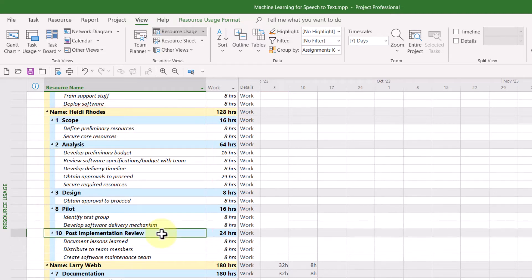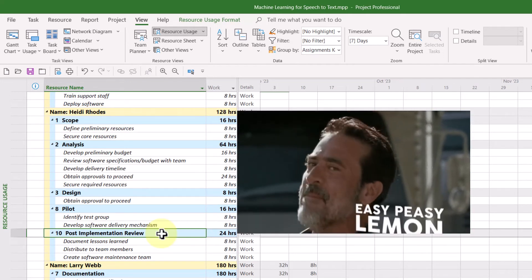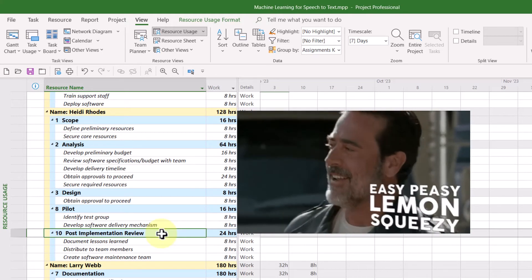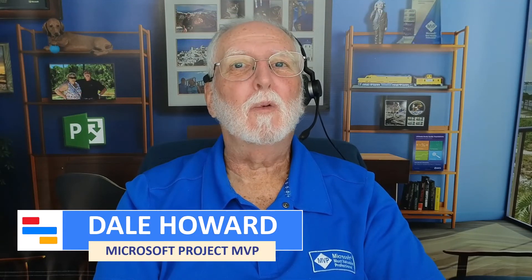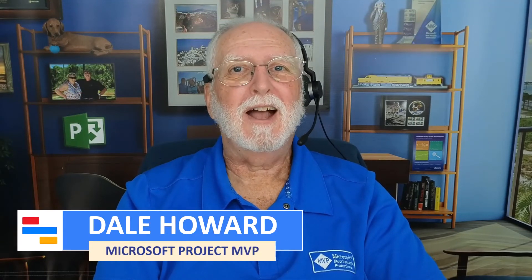So that's the secret for displaying summary tasks in the Resource Usage view. Now you know how to use that special resource group to display the work breakdown structure of your project in the Resource Usage view.